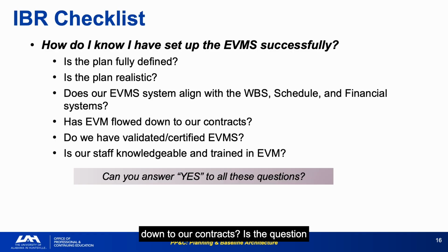Has EVM flowed down to our contracts? Is the question that catches programs off guard. If your prime contractor has a compliant EVMS, but your major subcontractors do not, your performance data has a significant gap in it. Is our staff knowledgeable and trained in EVM? Is the execution readiness question. EVMS that is technically compliant, but operationally misunderstood produces reports that appear correct, but do not reflect the project's reality.